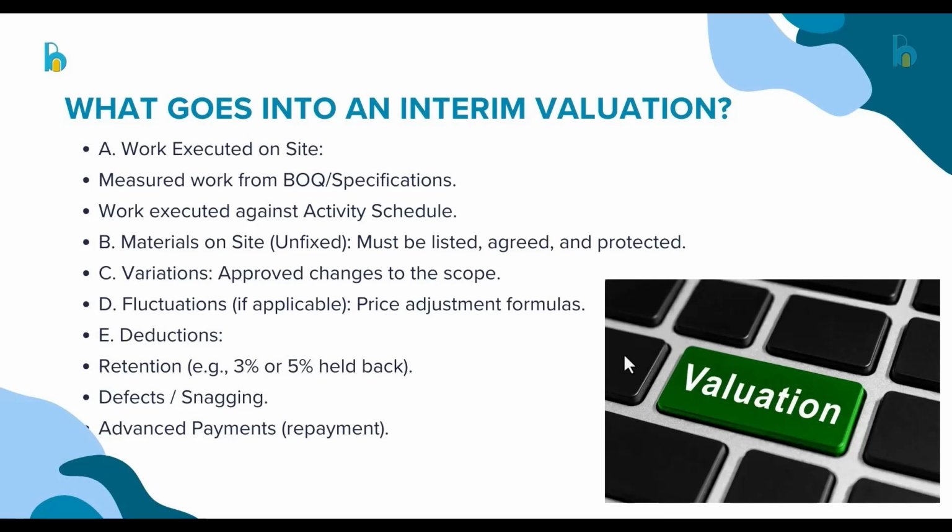So the moment the contractor executes the work up to that milestone, depending on the agreement, valuation is going to be prepared to pay the contractor that agreed money. But in some cases where advance payment is given, he's going to use the advance payment to execute those works. So after valuation, they are going to pay him and also deduct the advance payment.